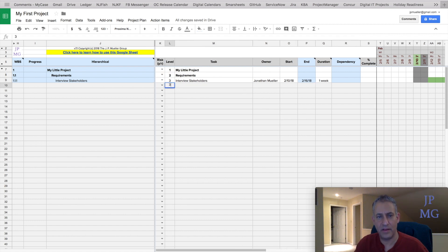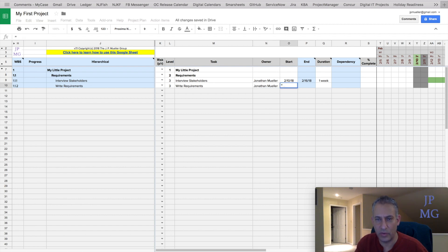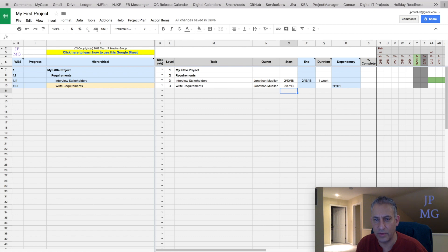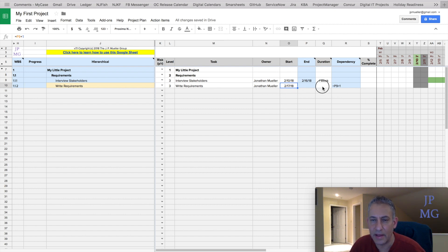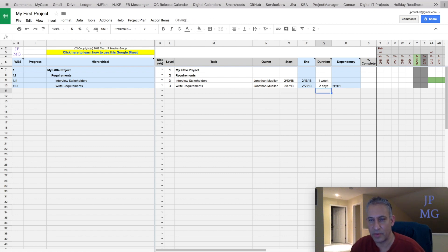Let's go back and add another task. Let's call it "write requirements" and assign that to me as well. We're going to make the start equal to the end of the previous task — grab P8 and add a date. Notice it's going to make it start on 2-17. We'll make this a two-day effort, and it's going to end on 2-21.